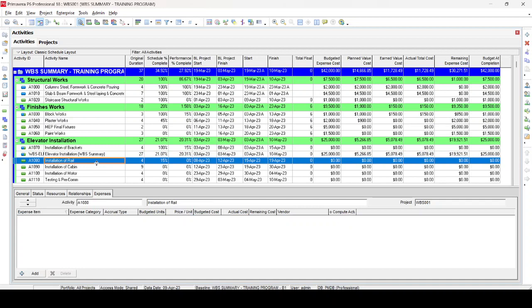In this case, you see here how we assigned our WBS activity and what steps are required. Number one, we have to change the activity type. We have to select the resource or unit per hour for the activity without resources. Then we have to make sure some particular changes are made in the calculation tab. Then we assign this as our baseline and then update as normal. So I hope it is helpful for you in the future for your projects and for activities with top-down estimation like elevator installation, garbage chute installation, etc. If you like this video, please like, share, and subscribe to my channel, and please give a thumbs up. It will be support and encouragement for me to make more good videos for you. Till next time, thank you very much for your time. See you in the next video. Take care. Bye-bye.